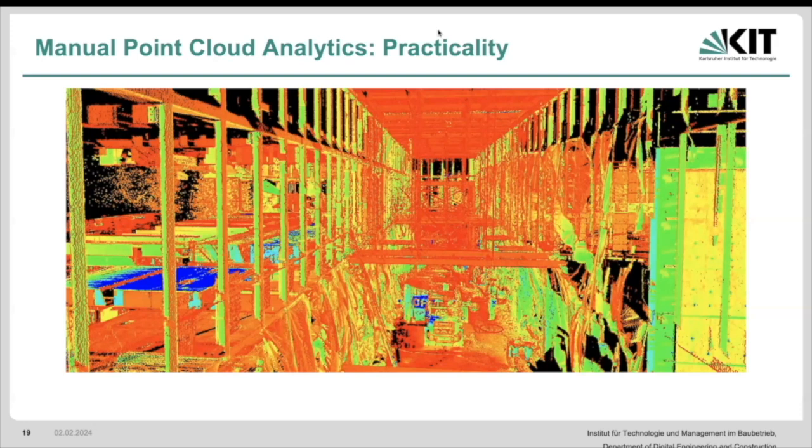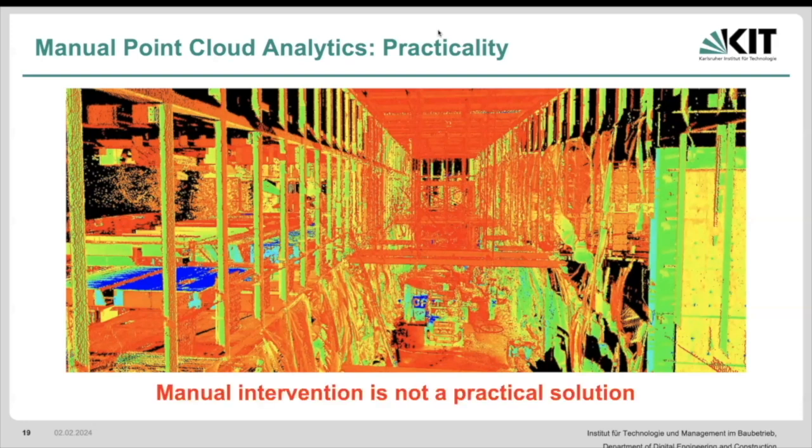Okay, so it's not practical in terms of being time consuming. That means that, even setting aside the amount of data that we have, it's just not possible to process and analyze that information on time to be able to utilize it. If we're getting it every day, but our processing is going to take 2 weeks, it's not even going to be useful, right? And that's what's important here.